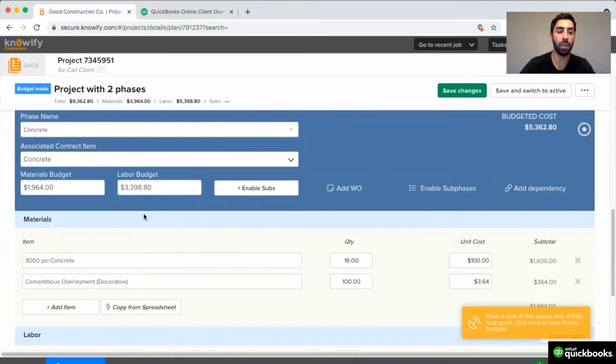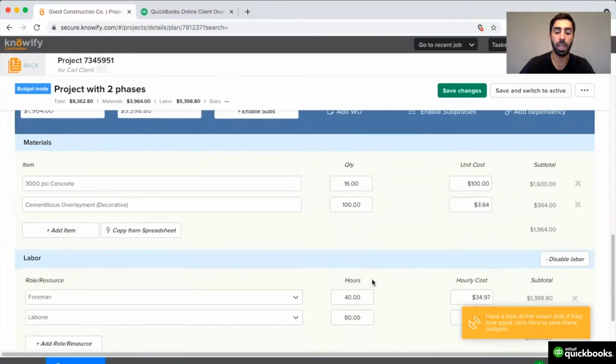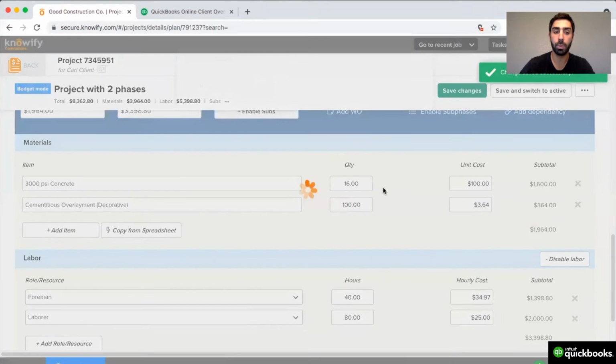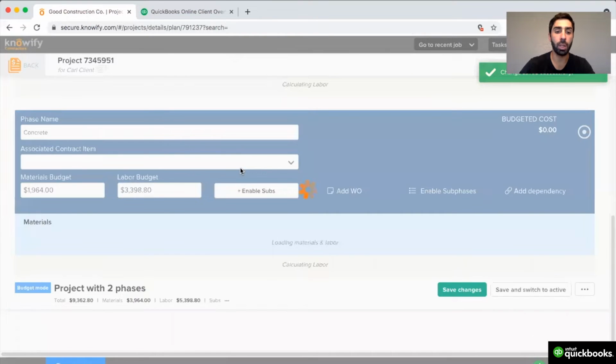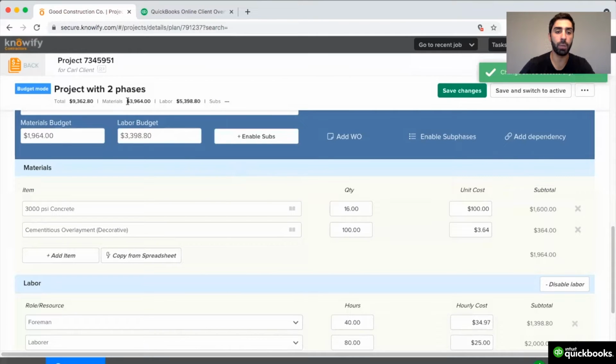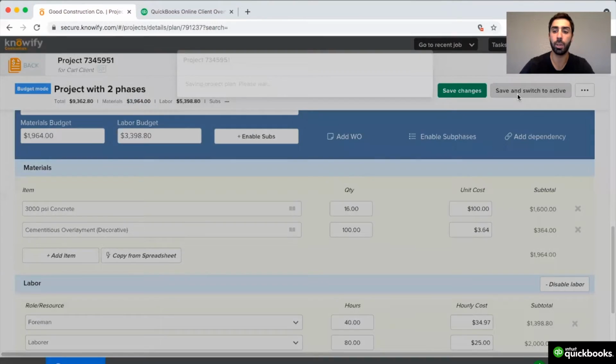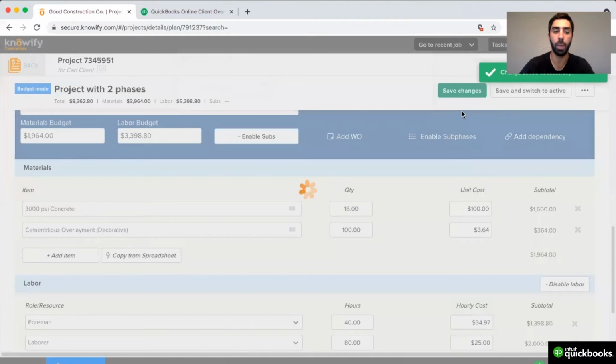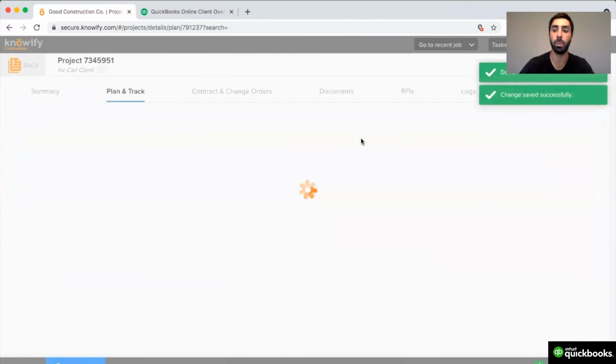You can see that I have a detailed budget that's broken down into different materials that need to be ordered and different hours of different types of employee that I included when creating my line items. Now I have a target dollar figure that I'm trying to reach whenever I'm adding cost to my job, and I can define our progress to show us how far along we are on the job as far as money spent versus money estimated.